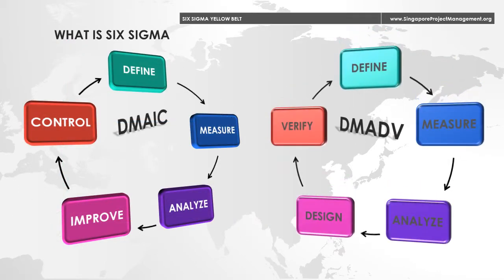Six Sigma projects usually follow two main methods: DMAIC and DMADV. They each have five phases and some similar processes. DMAIC is used primarily for improving existing business processes, while DMADV is used for creating new products and process designs.